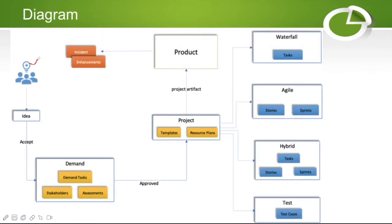This is the PPM diagram. End users have complete access to the idea portal — every user can create an idea even without a specific role. The idea manager decides which ideas to accept or reject. Once an idea is accepted, it is converted into a demand. The demand is refined — stakeholders are added, assessments are done — and the demand manager decides whether to approve or reject the demand. If approved, a project is created from the demand.